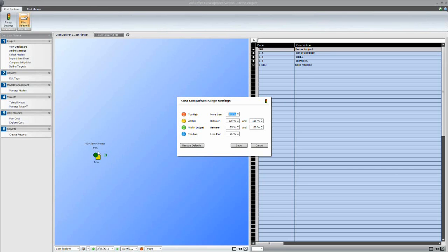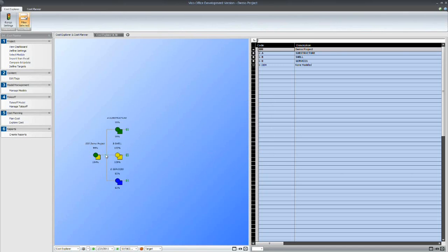But you can just manually define that, and that's how it will be shown in this tree. And then if we expand on that, it's the same estimating structure that we've used. We've got uniformat, so we've got substructure, shell, and just as an example here, this building is actually within budget with this version. And the previous version, it was over budget, and we can trace that back and say, okay, it's the exterior enclosure that was causing the issues.